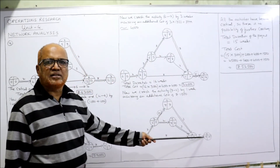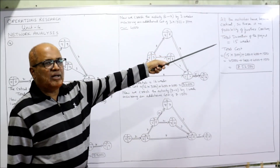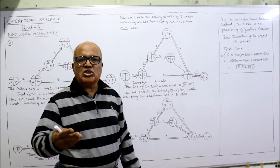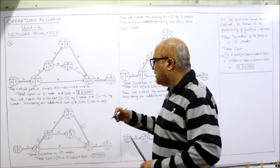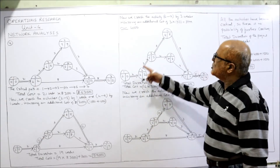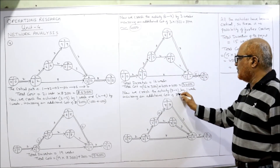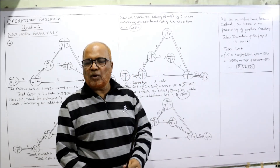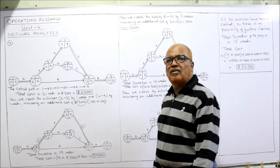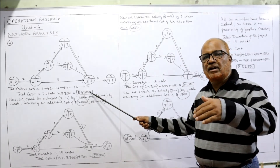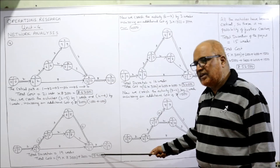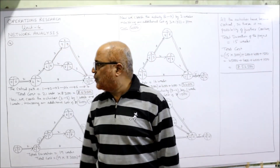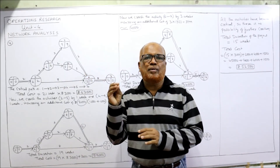Total duration of the project is 15 weeks. Total cost: 15×3000=45,000 plus additional costs — first iteration 2000, second iteration 4000, third iteration 1500 — total additional cost 7500. Project total cost = 45,000+7,500=52,500 rupees. Without crashing the cost was 63,000; after systematic crashing it came down: 63,000 → 59,000 → 54,000 → 52,500. This is the end of problem number 4. The next and final video will cover problem number 5.